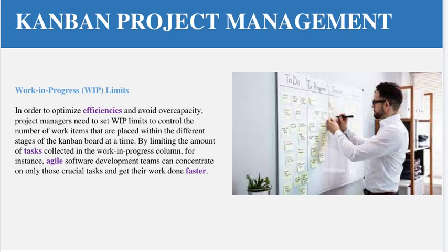For example, in progress, basically you have only, for example, 5 developer resources. So you know one resource can deliver 5 tasks at a time. So that means you cannot take more than 25 tasks at a time. So you can impose a limit in work in progress that above 25 tasks you will not take tasks in progress.